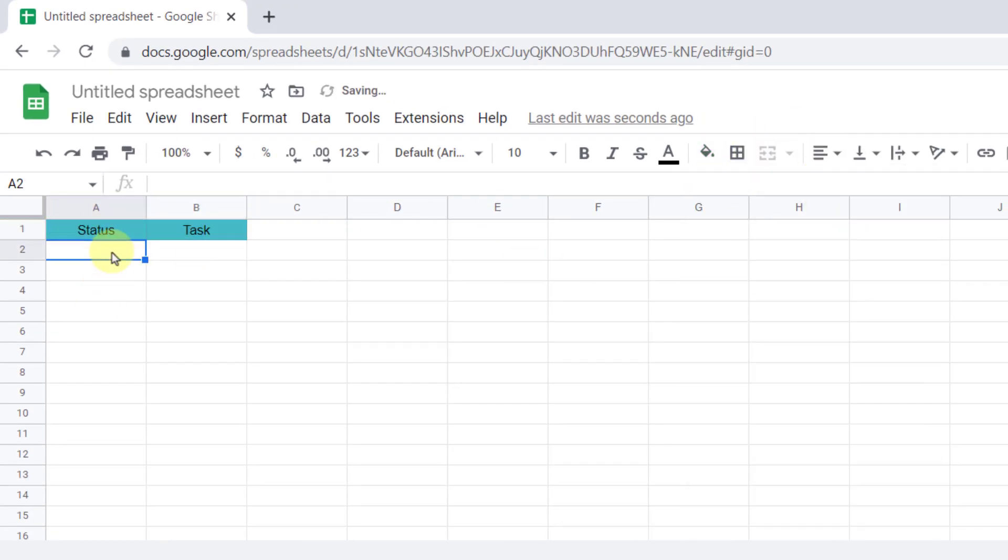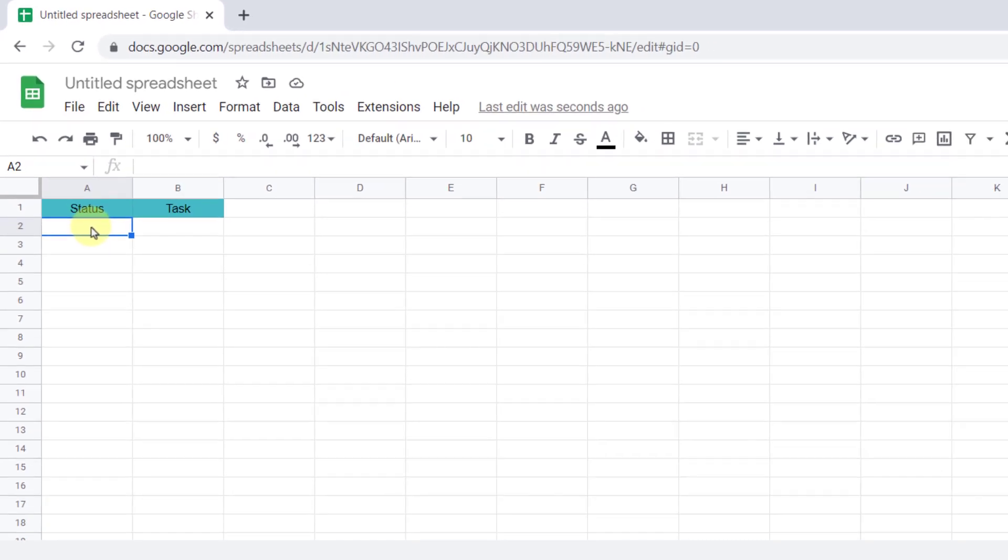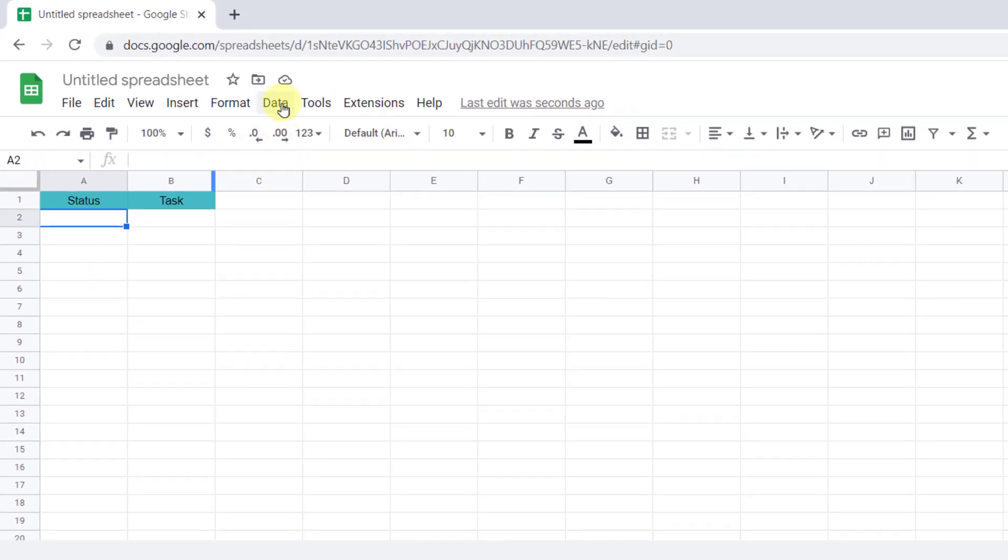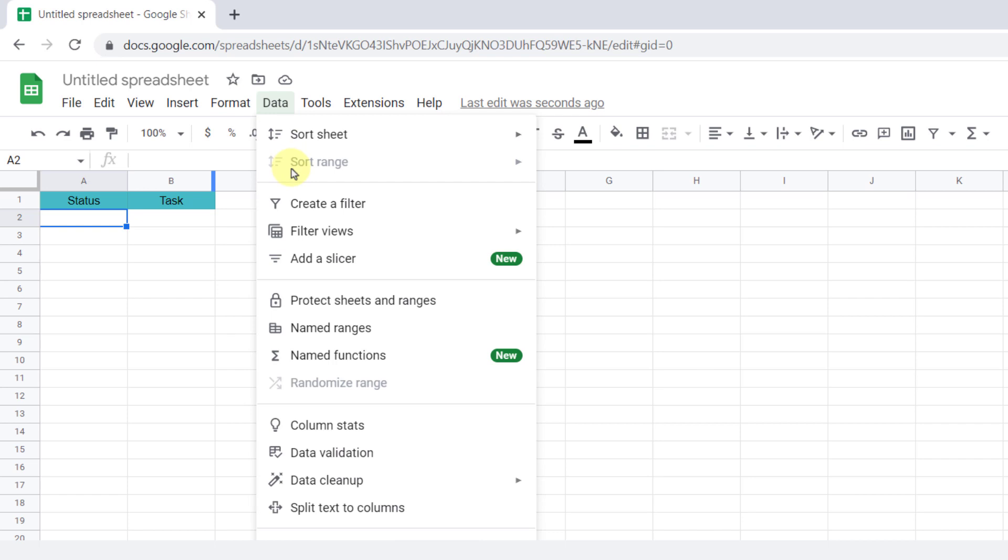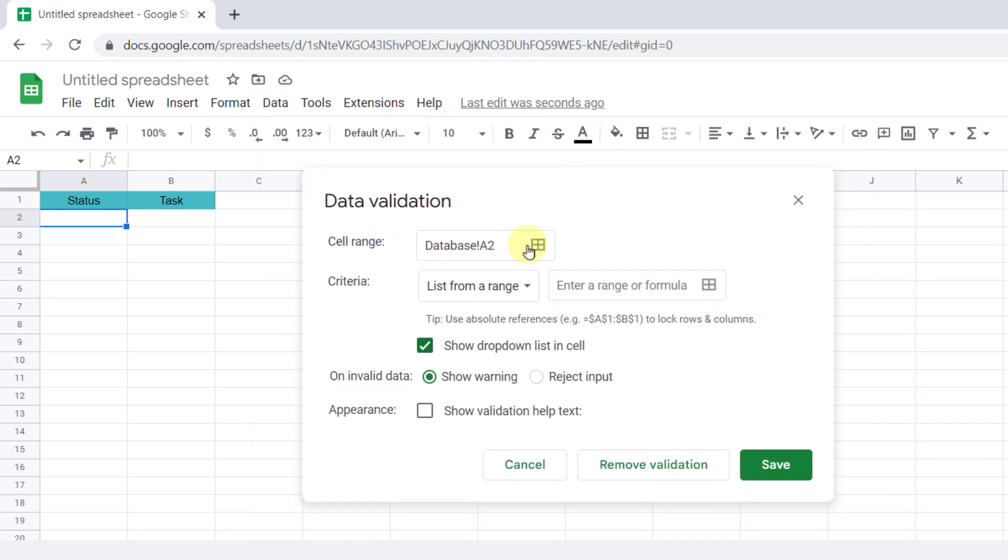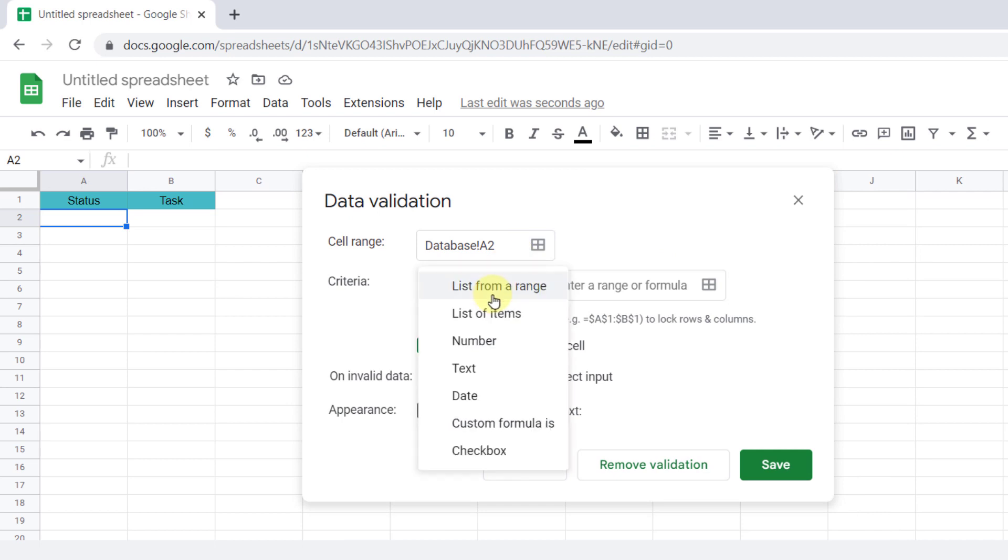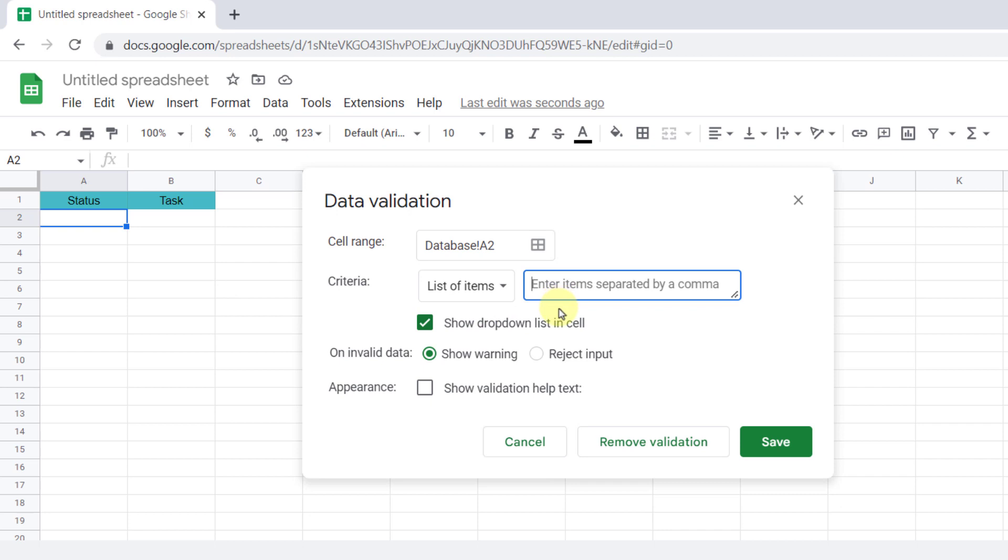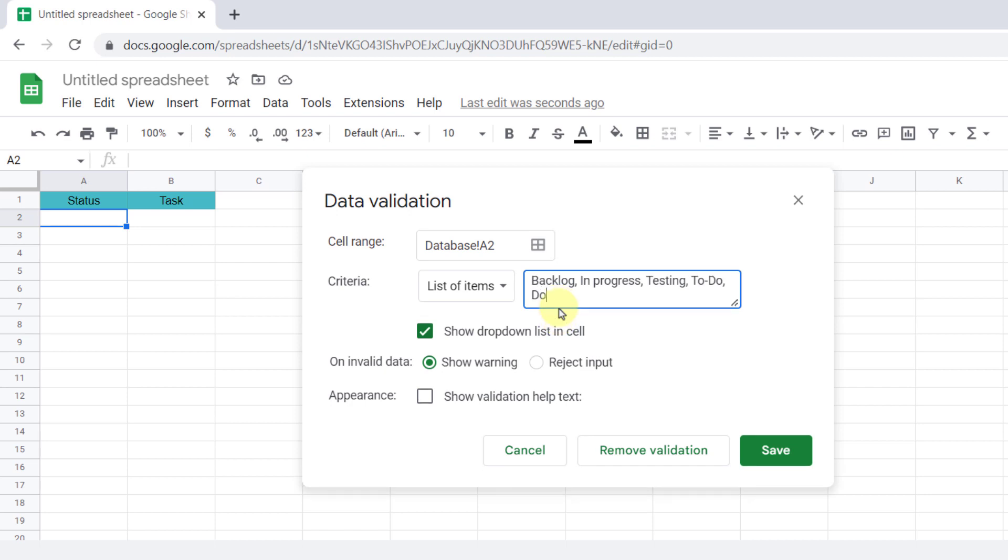For status, I want to have a dropdown list. So on the Data tab, I choose Data Validation. This panel window will open. Now for criteria, I select a list of items and enter the statuses and separate them with a comma. I typed five statuses: backlog, in progress, testing, to do, and done. I prefer to reject the input and save it.